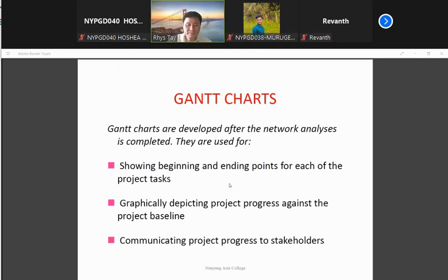So you know that at the end of the day, when you do the critical path analysis, right, you have to come up with the outcome, the so-called time for each WBS work scope, the schedule. Then you can put it into the Gantt chart. Okay, and a Gantt chart can use Microsoft Project, can use Primavera, can use BIM, right? All these things can be done, right?